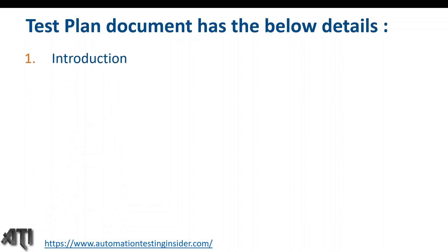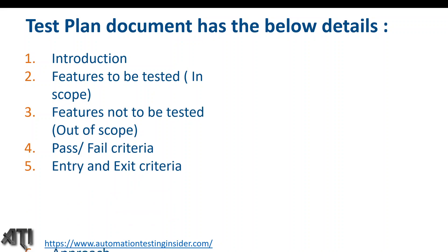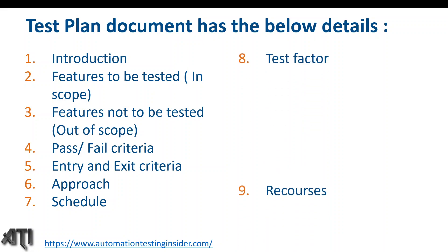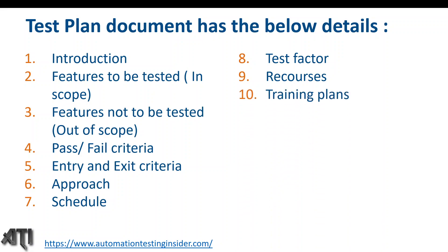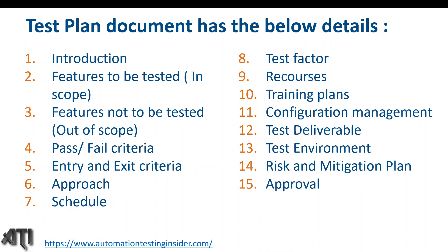Now let's talk about the different sections in a test plan document. The test plan has the following details: introduction, features to be tested (in scope), features not to be tested (out of scope), pass/fail criteria, entry and exit criteria, approach of testing, schedule of testing, test factors, resources, training plans, configuration management, test deliverables, test environment, risk and mitigation plan, and approval of the test plan.